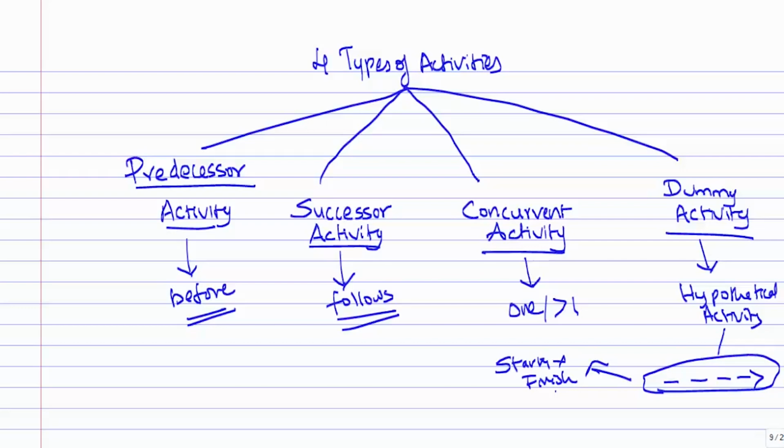Scenario 2 can be to identify and maintain proper precedence relationships between activities that are not connected by events. So it is basically to create precedence. And the third one could be to bring all loose ends in the diagram to a single initial and a single terminal event in each network using dummies. This might sound a little technical now, but when you look at a real diagram prepared with dummies, you will be able to appreciate it.